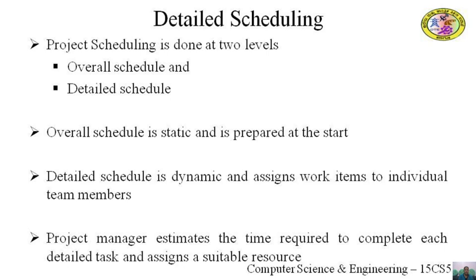The major phases identified during effort and schedule estimation for the detailed schedule are divided into small schedulable activities in a hierarchical manner. For example, the detailed design phase can be broken into tasks for developing the detailed design for each module, review of each detailed design, fixing of defects found, and so on.